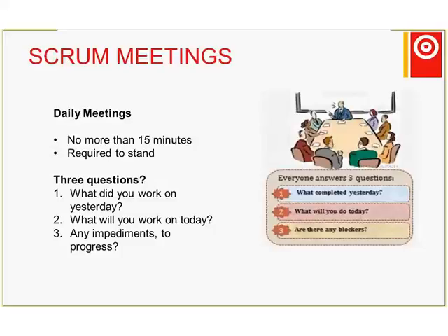So in the Scrum we have a daily meeting, a short meeting where everyone answers three questions: what they did yesterday, what they plan to do today, and what problems they've got in terms of what is preventing them from doing their work. So the team can jointly know what the whole team is doing and progress on the project.